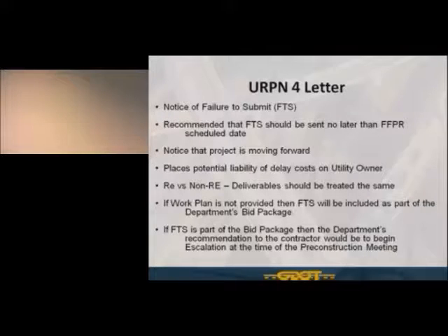Now, one thing that is important to understand, if you remember I mentioned earlier this morning that utility adjustment schedules are now provided to our Construction Bidding Administration Office. So the UASs are included as part of the department's bid advertisement packages. If part of the work plan, including the utility adjustment schedule, is not provided to the department, then the FTS letter that was submitted to you identifying that we did not have that utility adjustment schedule will be included as part of that department's advertisement bid package.